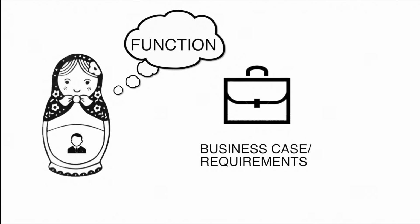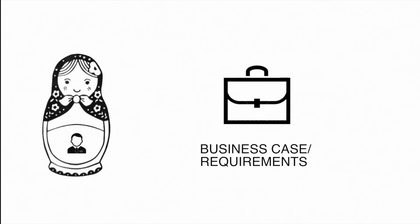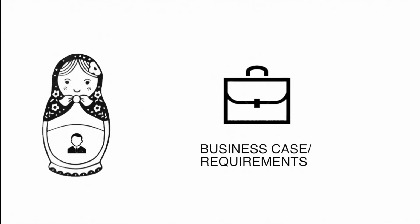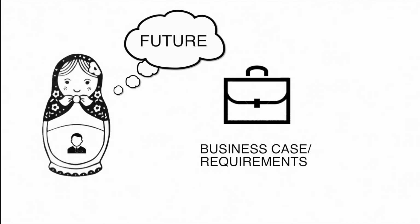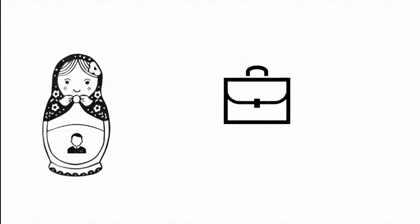To establish these points, the project team carry out a market analysis using current and historical data to find trends and predict future demands in order to set a benchmark price. This is what the consumer will be charged for the end product. Here lies an element of risk regarding the availability of reliable cost data. Often the benchmark price is based on corporate databases and past project data that can be out of date and not specific to the product. Therefore, the predicted benchmark may be inaccurate.